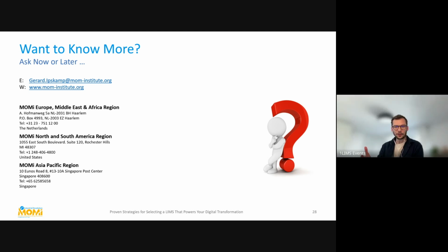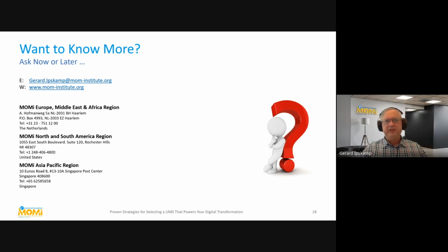Would you recommend that often within a LIMS implementation project? I would recommend it not directly, but after 3 to 6 months, because then people start learning to work with it, get ideas what could be done also, maybe missing an interface which was intended but was not implemented, and you can pick that up and do it a little bit later. So yeah, I will do that. It's not expensive. If I did the selection and they asked me back to do that, it takes maybe 2 or 3 days for me to do that. It's not that difficult, and not too expensive.